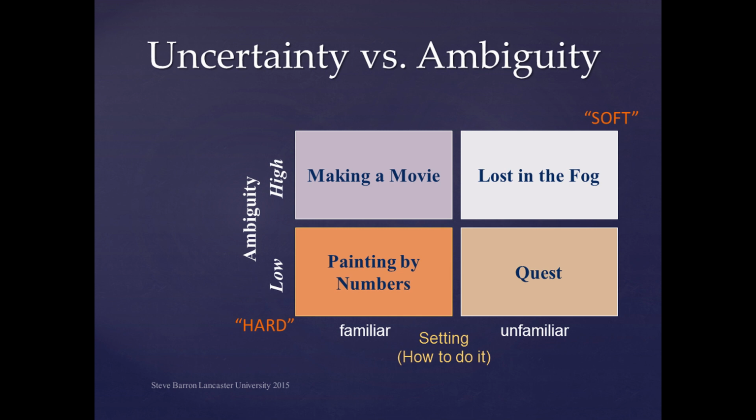Regarding familiarity with task, I now redefine this as the notion of ambiguity, or a number of different ways to define a situation or outcome. This suggests that different stakeholders can have different views or perspectives about a project. If the stakeholders are in agreement with similar perspectives, then ambiguity is low. If there are many different perspectives held by different stakeholders, that means there is a lack of agreement and ambiguity is high.